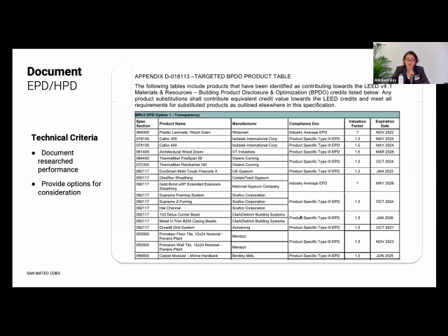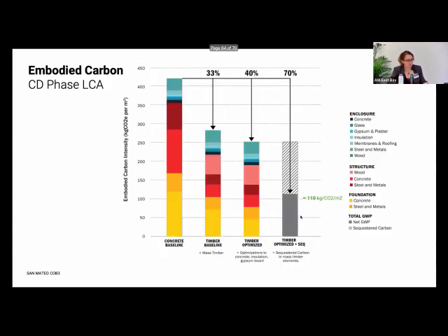And that being said, I think, have a target plan. If you know you're looking for a LEED credit for EPDs and HPDs, write out that plan so you can hand it to the contracting team and say, when you're procuring this, this was our plan on how to get the reductions in EPDs and HPDs. If you need to switch something out for procurement, give me another one. Trade out in that instance for us. A shout out to Atelier Ten, who did the next 2 slides in terms of the final calculation of embodied carbon. We were excited that their numbers came out very similarly to our internal tool.